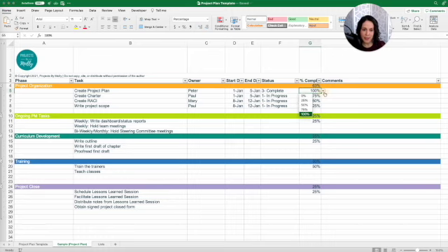And then with percent complete, here too, I am using a list. And the reason there is because there's not a lot of value gained when a task goes from, say, 4% done to 16% done. So save yourself some work. If you've done one thing on your task, if it's at least started, it's 25%. If it's half done, you're at 50. If it's almost across the finish line, but not yet, that's 75.